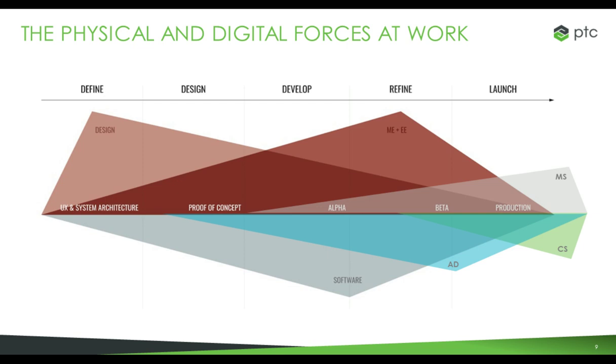And as the project progresses, there's more and more time spent with other engineers. And we've actually learned it's really important to start getting your managed services folks in much earlier in the project, albeit not a lot of overhead for it, to understand the expectations of the product going forward. They work on things like making sure the system is designed to perform as well as scale, so that you don't launch from POC right into production and realize that you've underestimated your infrastructure, and then you've blown out your budget, your cost.